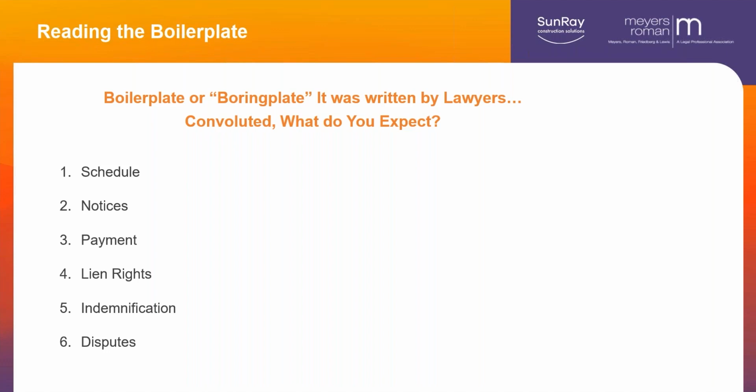Now, there is a statute in Ohio that says for negligence issues that you can only indemnify them up to the percentage of your liability for the problem. So, you know, if they're 50% responsible, you're 50% responsible, your insurance company should pay 50%. But that's not going to apply to a contract indemnification. And there, your insurance company is not going to pay for those legal fees coming out of your pocket.